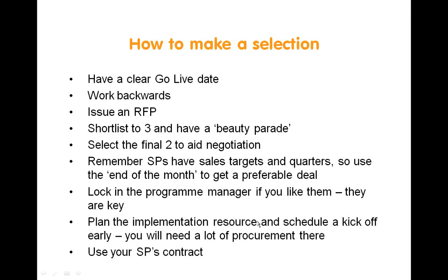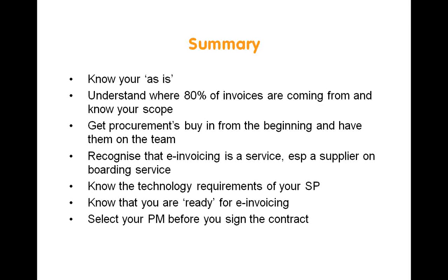Lock in the program manager if you like them. They are key to your program. And plan the implementation resource nice and early. Let everybody in procurement know what you're doing and why, and get your kickoff scheduled in nice and early. Make sure procurement are actually there. Use your service provider's contracts. Chances are, in the suite of your legal department, you do not have the right kind of contracts. So use your service provider's contract.